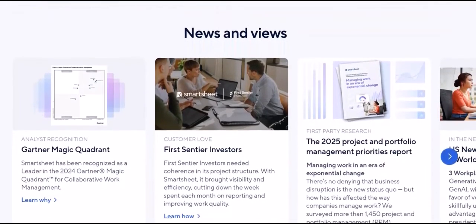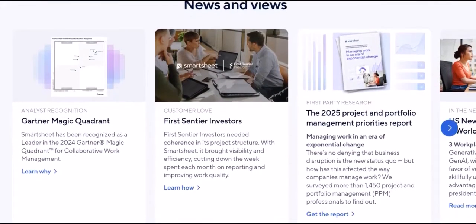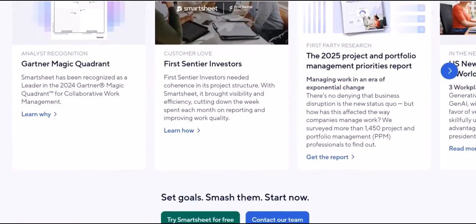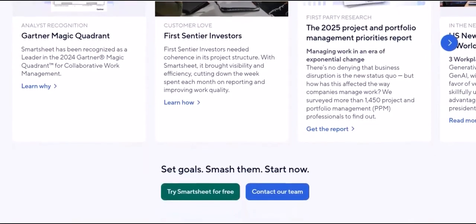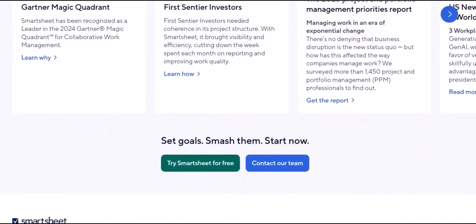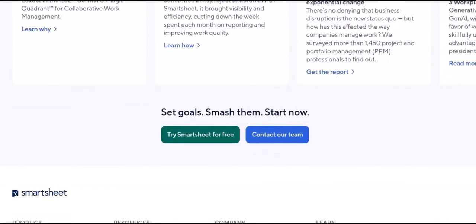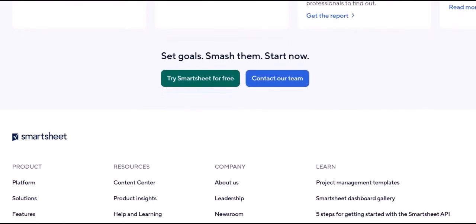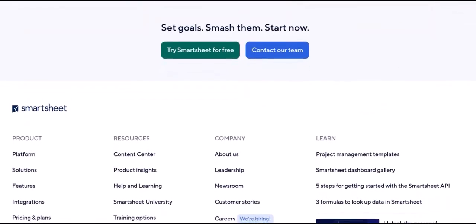Use pivot tables to summarize data by assignee, status, priority, etc. across your task list. Create a separate dashboard sheet with charts, bar charts for status, pie charts for %complete, and key metrics linked to your data and pivot tables. Use slicers to filter data dynamically.